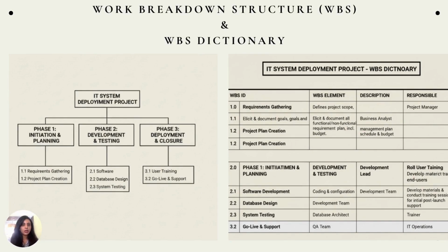So we break down the project into tasks, and we import the tasks and create the WBS, where we have pointers, the activity IDs, description, who will do the work, the resources, and all the details you need to know. So things which we need to consider while creating the cost baselines are resource availability, which resources are available, and when and how much it will cost. That we will get from the WBS dictionary.